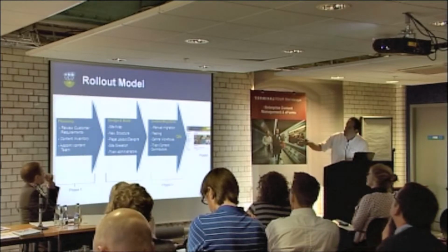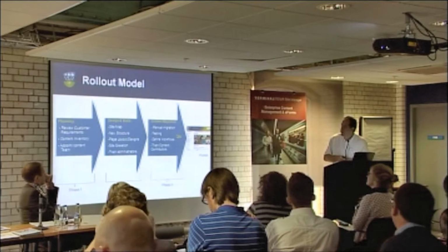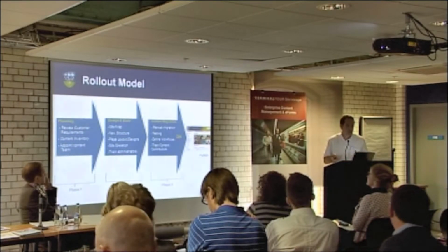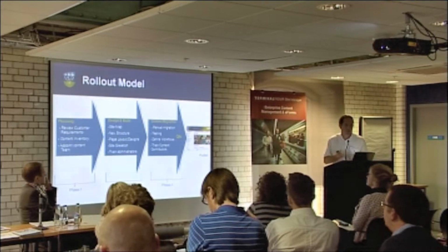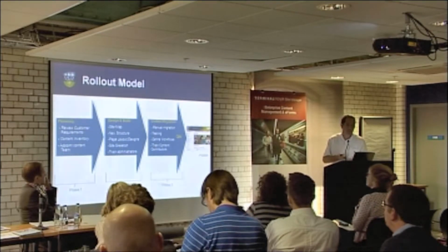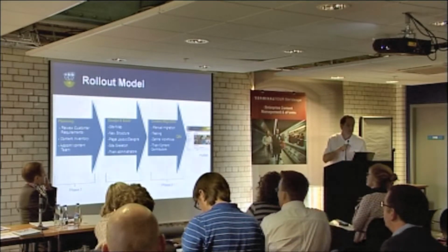Then we're into phase 2, the design and build phase, reviewing the information architecture. You're all very familiar with that. Any customization of page layout and designs, you have to agree those and integrate them. We would integrate what we would call the site skeleton into the system for them, so they get their styles, templates, any images that they would give us, and some sample content. But we stay clear of actually migrating content in.